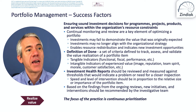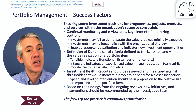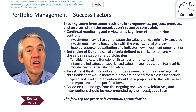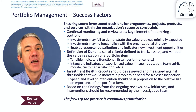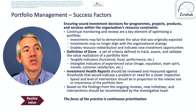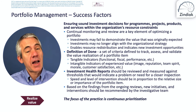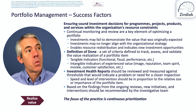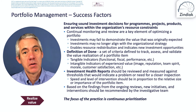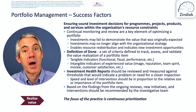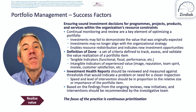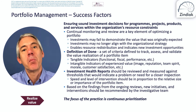Continual monitoring and review are a key element of optimizing your portfolio, and that fits in with agile — at the end of the sprint, you review what you've produced and how you've produced it. Investments may fail to demonstrate the value originally expected or may no longer align with the organization's strategy. It also enables resource redistribution and indicates new investment opportunities. The longer you go without a review, the greater the risk that one of those negatives will impact. The shorter the interval, the lower the risk — but there's a cost to doing a review, so you've got to balance the two. I would say no longer than a month, as Scrum does with sprints of one month or less.